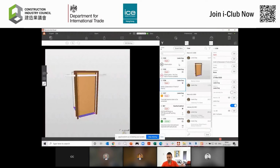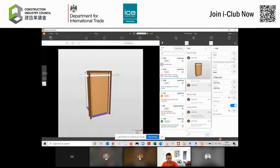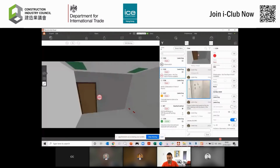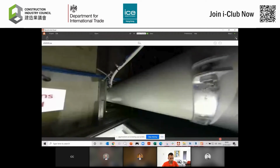So 2D review, you can do all of that in Rvisto. 3D review, we can do all of that here as well. We've also brought in our clashes from a variety of clash detection tools, such as there's a number of them. In here we've got some clashes from Navisworks and Solibri, but also site inspection as well. So we can start to see as the team are taking the project out on the site with a tablet, they can start to capture data in the field and verify if things have been built accurately. So as built verification, and we can go a step further with that with reality capture, where we can now start to bring 360 images directly into Rvisto.